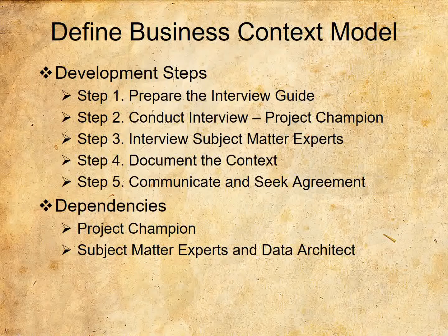Additional interviews with the designated systems architect can be used to clarify systems. Finally, interviews and reviews of the context diagram with subject matter experts identified by the project champion will complete and confirm the business context of the process under consideration. Prepare the interview guide. Be sure that the interview guide used with the project champion during the goals clarification portion of the PE methodology includes questions that will provide information required to complete the context diagram.